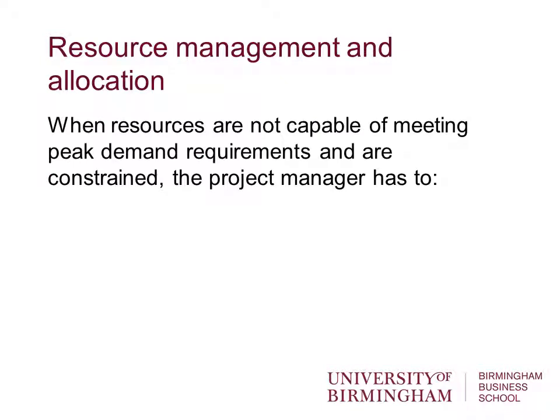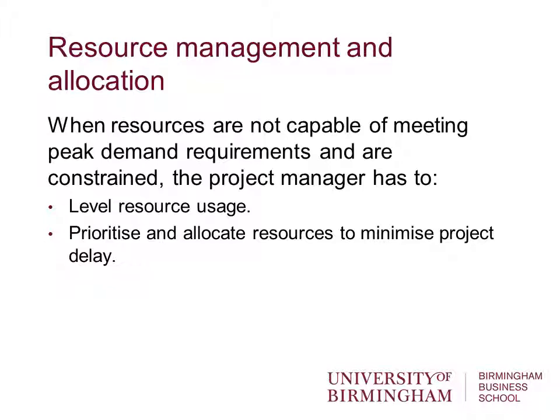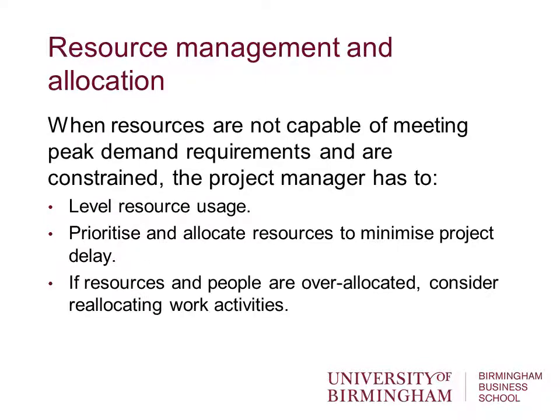Okay, so when resources are not capable of meeting peak demand requirements and are constrained, what does the manager have to do? The manager has to level resource usage, prioritise and allocate resources to minimise project delay. Okay, so this is important as well. Levelling often adds time into the project, but we have to prioritise the resources to ensure that we're not adding undue time to the project.